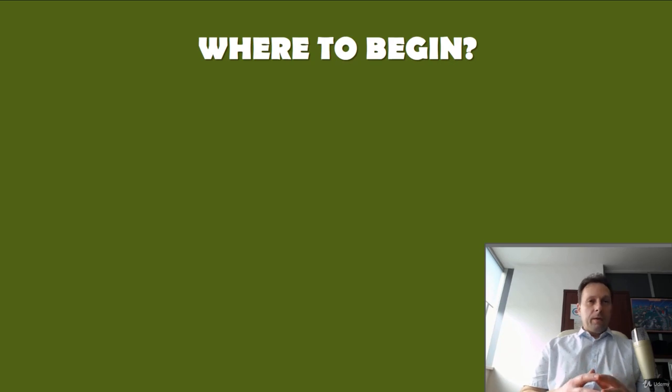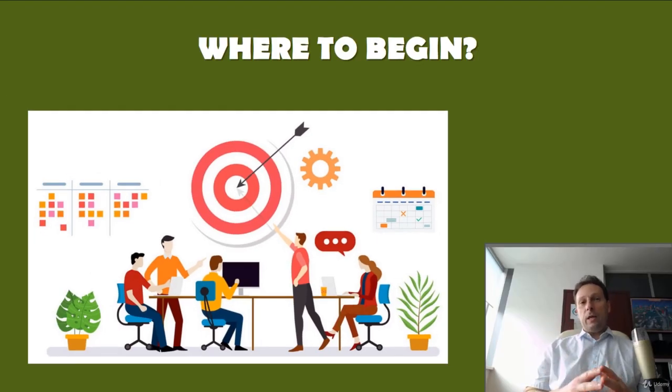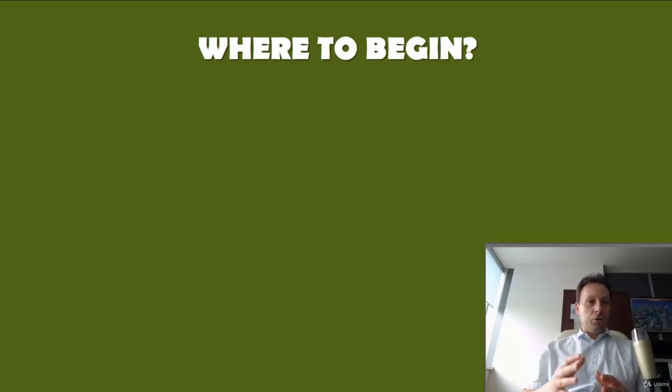So where to begin? The defining process should be collaborative between stakeholders and those doing the work. Whether it starts with brainstorming or suggestions by developers, there should be ample opportunity for commitment and unanimous support for the final product. Assigning owners to each criterion is also a good idea, as they can be the arbiter if there is a disagreement about a particular item's ability to check that box.